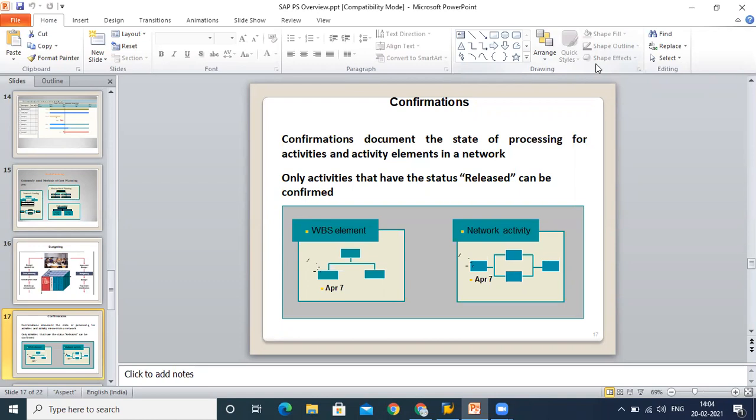Confirmation is a tool which will help us to know progress and calculate the duration for our remaining activities. Confirmation documents the state of processing for activities and activity elements. In our civil work, there are multiple activities involved. If I want to know which activity is at which level, I have to do confirmation. At the time of confirmation, we can confirm the different activities.